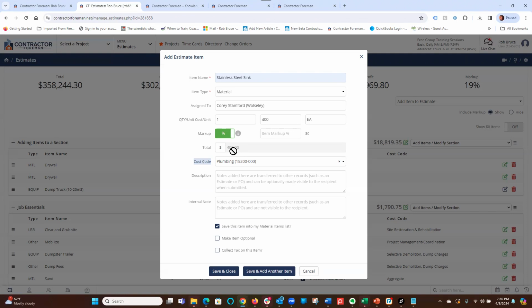So now we've got our budget number, $400, because I said 400 here, so it put 400 down here, but I need to make money on that. So I'm going to throw 20% markup on it. So now the system knows that I've got 20% markup on that 400. It knows that I should make 480, and it's capturing, there's my seller contract amount to my customer, 480.